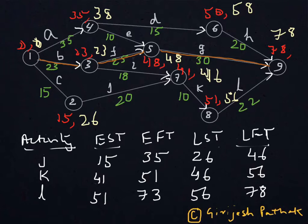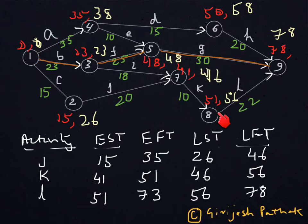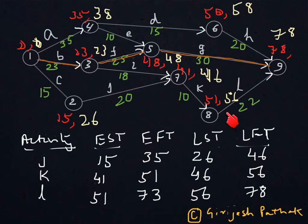Wherever you find a gap between earliest time and latest time, it indicates that on that node you can reach earliest by that time. For node 8, you can reach earliest by 51 days, but even if you reach there by 56 days your project is not getting delayed. It means that for node 8 you have 5 days extra. This is called slack.